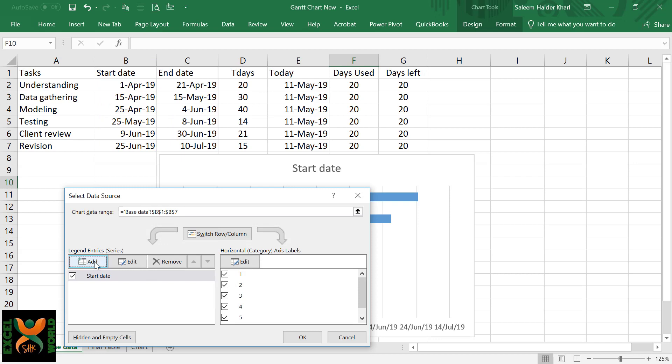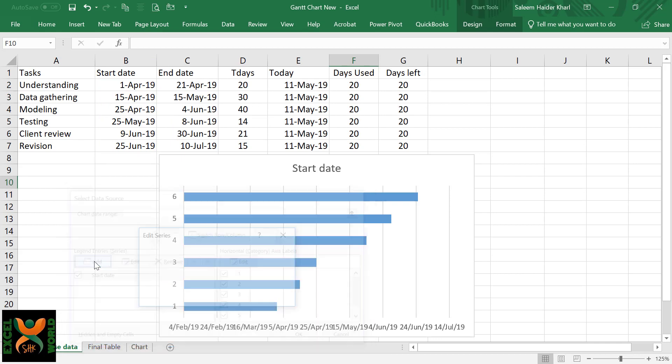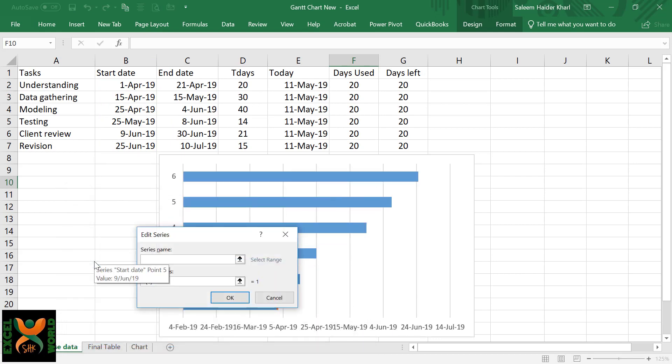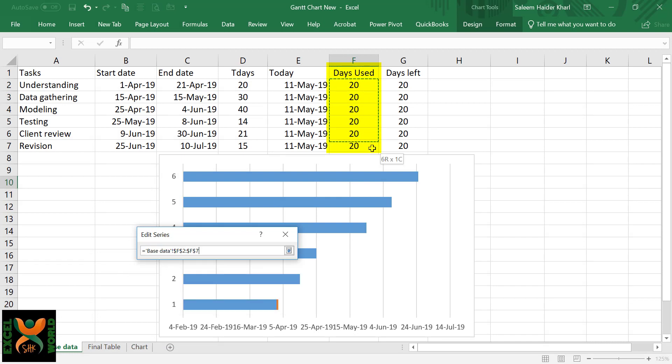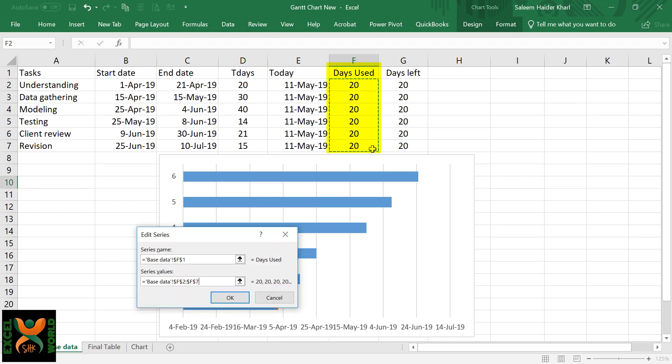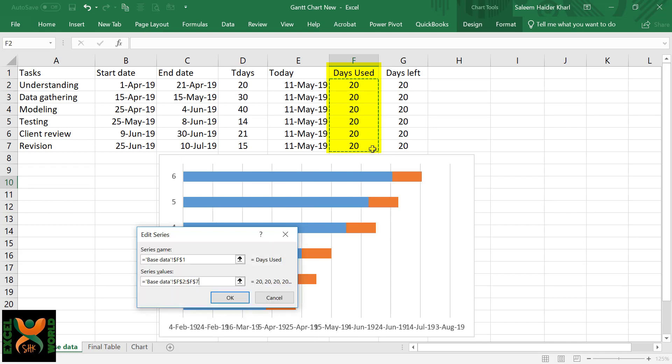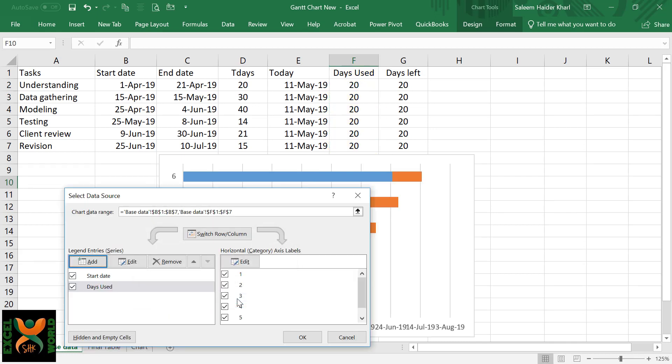Again, we are going to insert another series. For this, we will need the days used, and for the values we are going to select all the days used below that. Press OK.